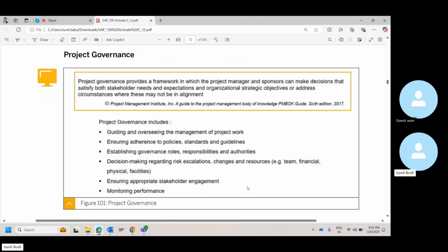You will have a section in the project management plan which will say if there is a resource change or resource swap, how do we go about executing the swap? So you have a plan or a process flow designed for that. You introduce the new resource; the old resource and the new resource will work together for 2 weeks or 3 weeks, and the KT plan will be published with the customer project manager and the vendor project manager in CC.